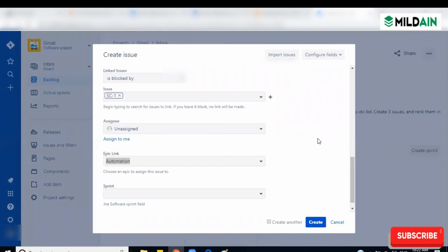First of all, your product owner will always be focused on the version, right? First, he will decide the version number. Version 1.0. So this is September. We have to go to production by the month of October, on such and such date. So from today to that date, this is version 1.0. And there are totally 400 stories in the backlog, and he decided around 20 stories have to be released by October 15th. Let me say October 15th is the first release, 1.0.